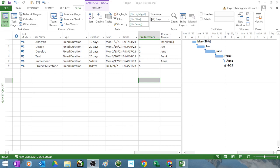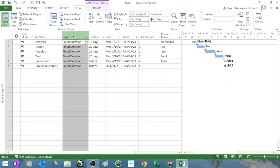But I just wanted you to know if you are struggling with the dates moving on you and Microsoft Project acting crazy, it's because you haven't figured out to fix the duration.